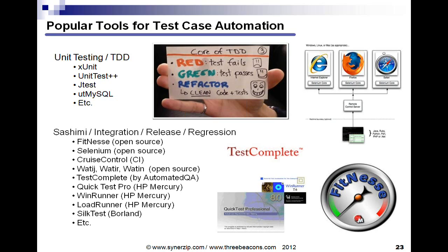In those cases, the 3:1 ratio is pretty good. For every 3 developers, 1 QA is a good starting point, the rule of thumb for the ratio. But on the other side is when you actually have a large body of code that has already been built and been installed for a while, and you have a large number of customers. You have to make sure all customer-specific test cases and integrations are being tested, and you have multiple environments to test for each release and all that. When you get to that end of maturity of software, then you're probably closer to 1:1.